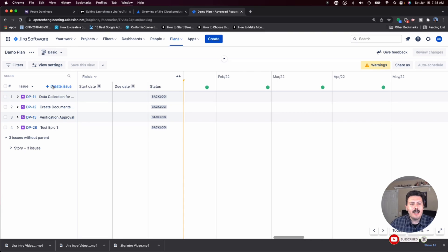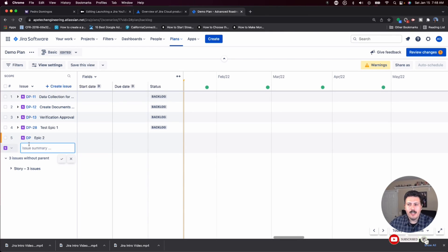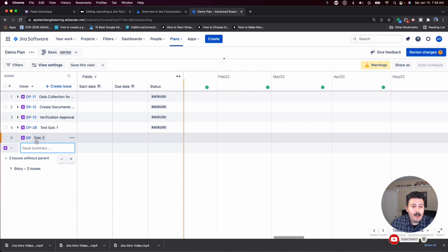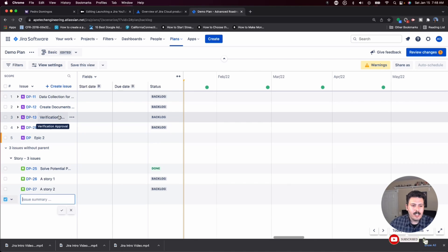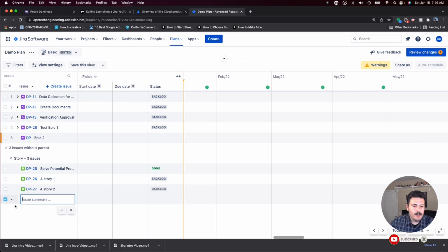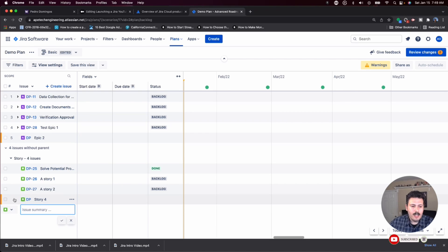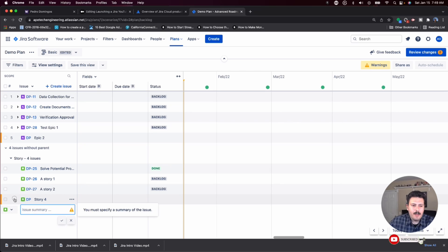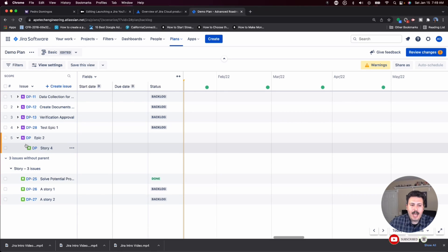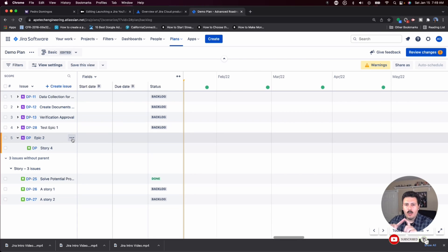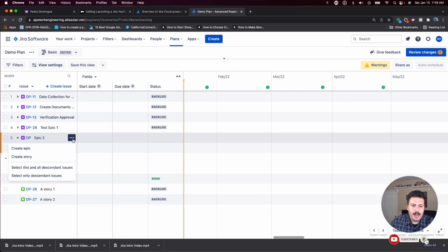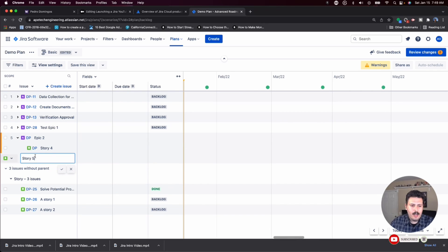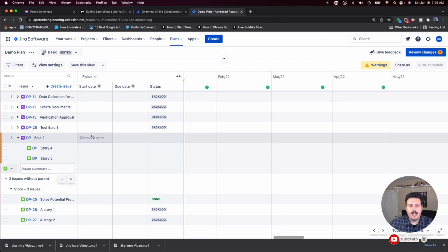For now, the fourth way: click the blue button here, create an epic, epic two, you hit enter. Again, it's going to automatically create that epic name for you. Now to create the story, you can either create the story and just create an independent story down below. I'm going to toggle it to be a story. I'm on story four now, so I just created an independent story that's not tied to any epic. I would have to essentially grab this story and associate it back to my epic if I wanted to do that. But if you automatically want to create that parent-child relationship between the epic and the story, you can actually click on these ellipses here for that epic and create a story. Now when you hit enter, that story is going to be associated to that epic. That's pretty much it.